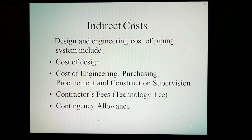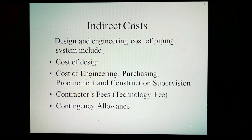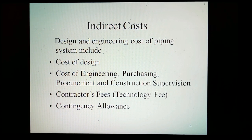Indirect costs associated with piping include design and engineering costs, which cover the cost of designing and engineering of the piping system, purchasing, procurement, and construction supervision. Also included are contractor fees, technology fees, and contingency allowance — an allowance to cover unforeseen circumstances such as labor disputes, design errors, etc.